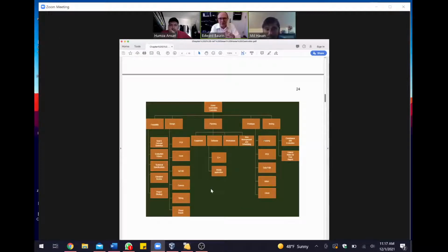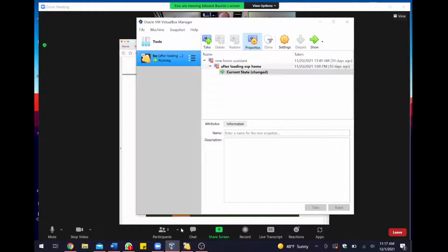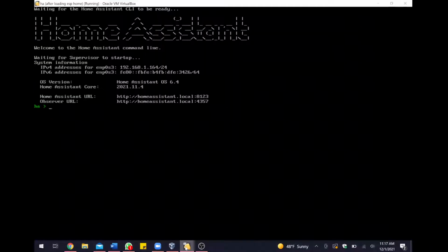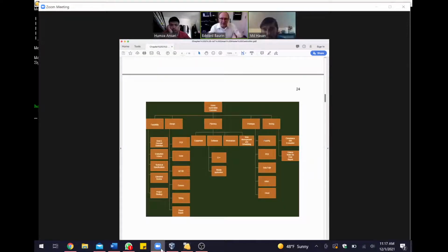First of all, you have to draw a diagram. Then you have to buy components. Then you have to make a PCB on the machine. Then you have to solder all the elements. Then boom, PCB is done. We have it. Then next one is the set of relays. You put relays on the PCB, also done. And then somebody has to do the coding for the data path.